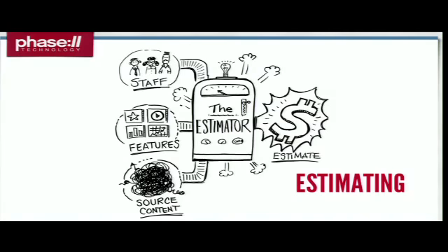One of the things I've seen contribute to project failure a lot is professional services organizations like ourselves come in, and we have a high degree of rigor and expectation around how we estimate everything from the ticket level, where we insist that the developer or the person doing the work is actually doing the estimate, and we're rolling all these up, sort of a ground-up process.